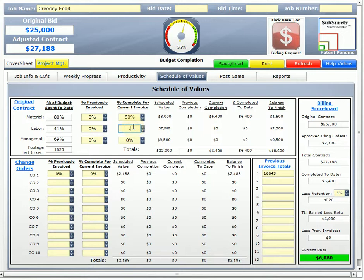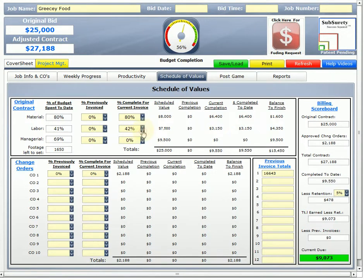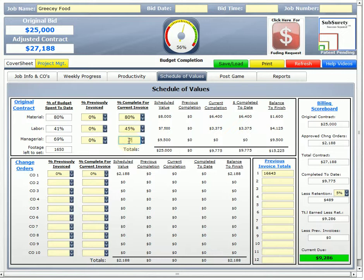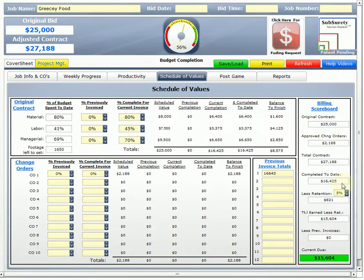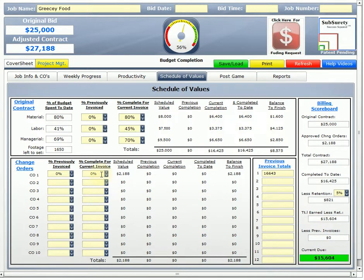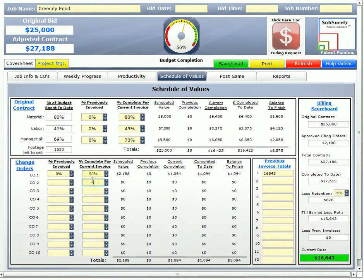If for labor, it says 41%, I'm going to go 45%, just a little bit high, but not too bad. You can always use the up and down arrows, if you prefer to do that. I just like to double click in there, and percentages are always 0.7, 0.75. Just put that in there, and it happens real quick. Immediately, it tells me what my total contract completed to date, less retention, total earned, 0 previous invoicing, and that's my current due. I haven't put anything on my change order. Let's say that I did 50% of that, and so that adds all of that in, and I'm good to go.